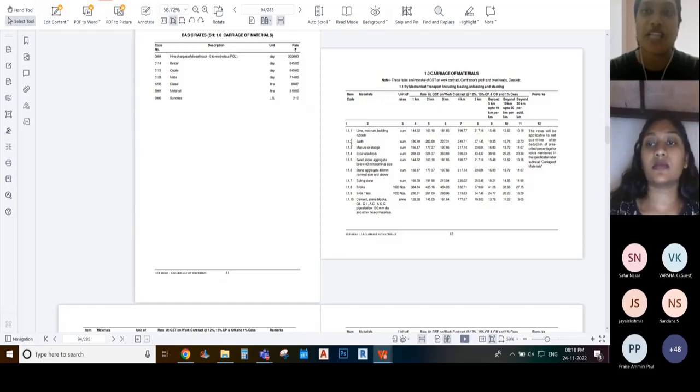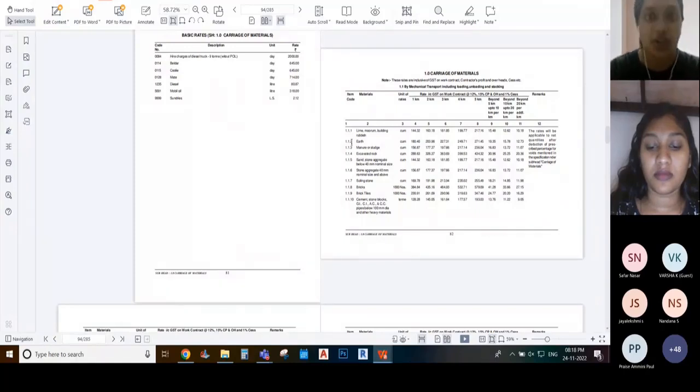Similarly, suppose I am going to start construction of my house in Delhi. I'm purchasing cement from the same company in Chennai. Will that cost of carriage be 1,000 itself? It won't be. It would be nearly 5,000 or even more. So the distance from which the material is transported has a major role in the rate of material, and it would also affect the project cost.